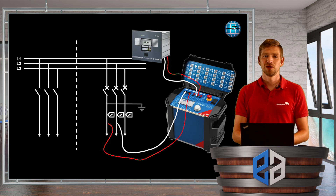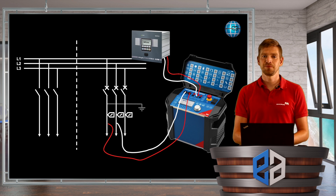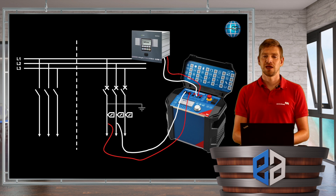Here is one example of a quick test you can perform. Such a distribution switchgear has, for example, a 630 kVA transformer which leads to a nominal current of 18 amps for a 20 kilovolt system. With this you can perform a very simple primary injection test, for example with a Compano 100, and verify the whole protection chain during the primary injection — tripping the protection relay and verifying that the circuit breaker is opening. This is a test you can perform in minutes.